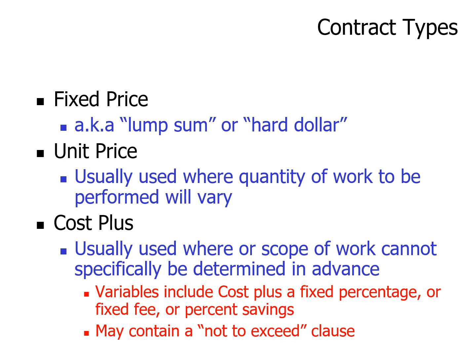All right, now I just want to look at some contract types. One type we have is a fixed price. That's what we call the lump sum or hard dollar. So here I'm going to give you a price for a swimming pool that I'm not going to be able to build for about a year after permits and materials. Here's how much it's going to cost you. Now it's like, geez, guys, how much can change between now and when that pool actually gets built? Real scary to do right now.